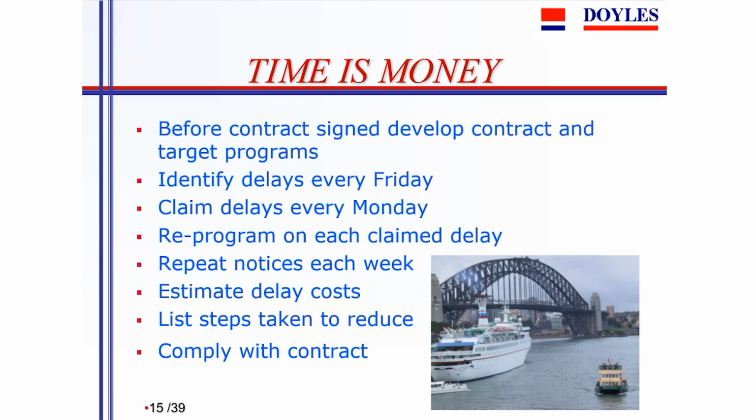Whereas if he set up the pipes and pumps and could drag out 50,000 litres, he might make a lot more profit. That is, the costs of setup and mobbing and demobbing are such that they'll affect the price he gets even with a constant amount.